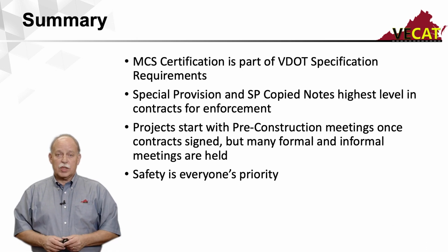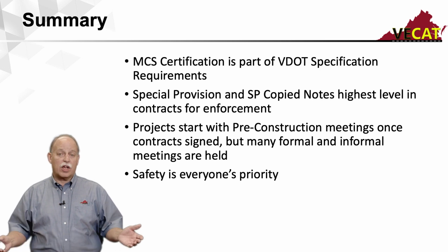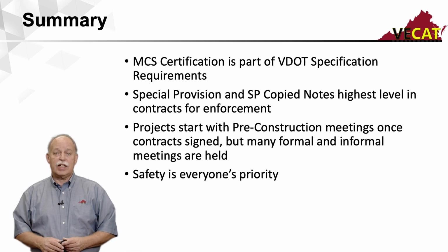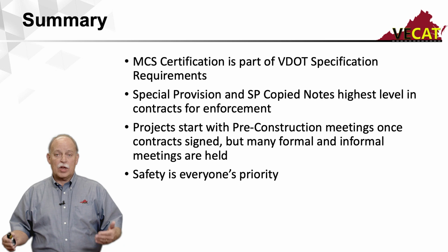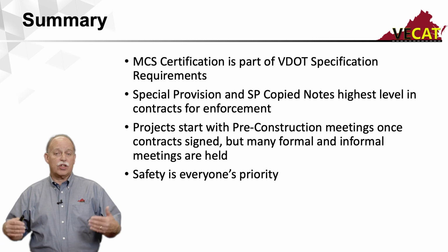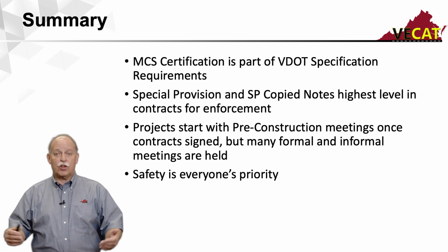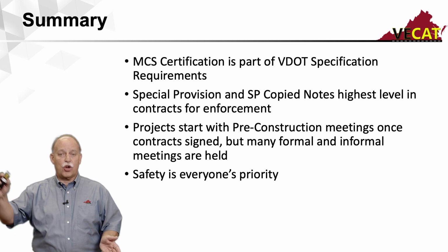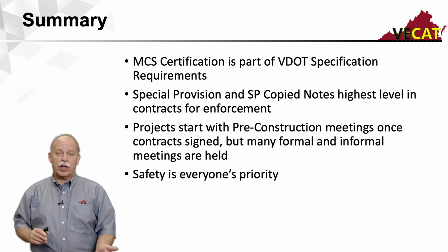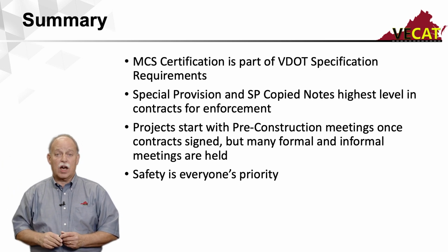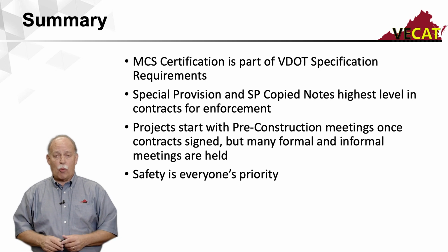In summary, the Material Certification School program is part of the VDOT specification requirements. I told you that in the very beginning. It's section 114 of the Road and Bridge specifications that details out what all those requirements are. One of the most critical things that we've talked about this morning is that hierarchy of specifications and communications and documents that VDOT uses throughout a project. Special provision copy notes are at that highest level. Remember that table that showed you how things in hierarchy and priority climbed up that ladder, and that special provisions and special provision copy notes are right at the top. So keep that in mind because that is critical.